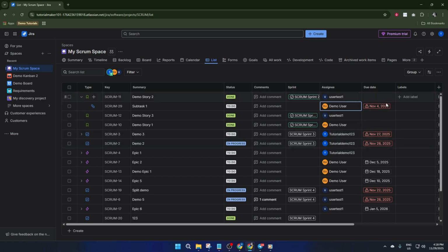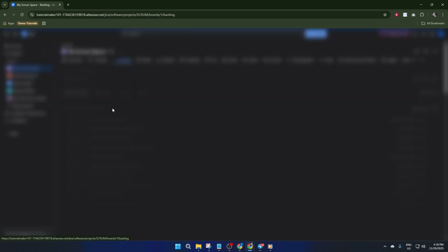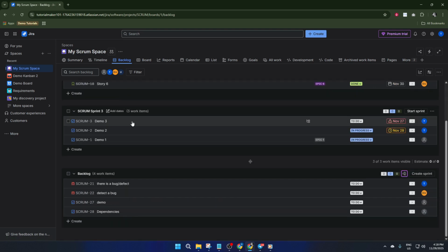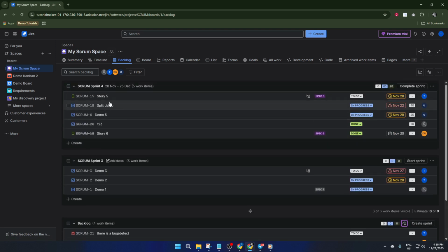One crucial thing to remember, subtasks should not replace tasks. Think of them as branches of a tree, not the tree itself or even separate trees. If a subtask's scope starts to expand, it's often a sign that it should be a full issue in its own right. Remember, like spices in a dish, subtasks add value when used judiciously and can complicate things when used recklessly. If a subtask becomes too complicated, it's usually better to create a distinct story or task out of it, ensuring appropriate tracking.